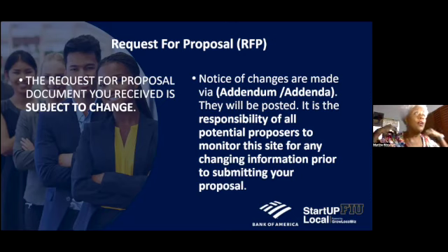So let's say you sign the award on Thursday night, please don't go and start spending contract dollars on Friday without having the notice to proceed. The notice to proceed can come the following Tuesday or Thursday, and the notice to proceed is the authorization that you can start spending money, that you can start working on that proposal and billing them for whatever that commodity happened to be.